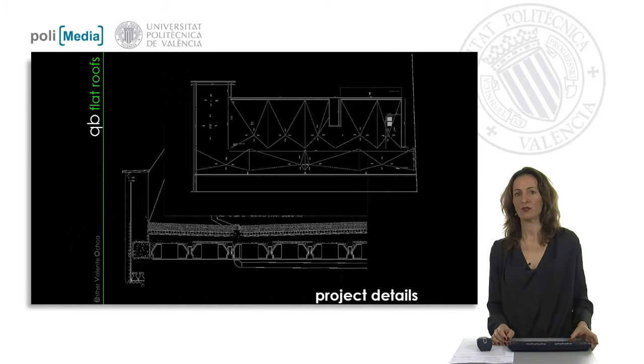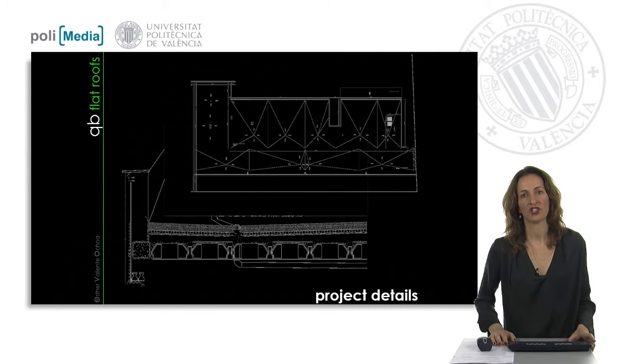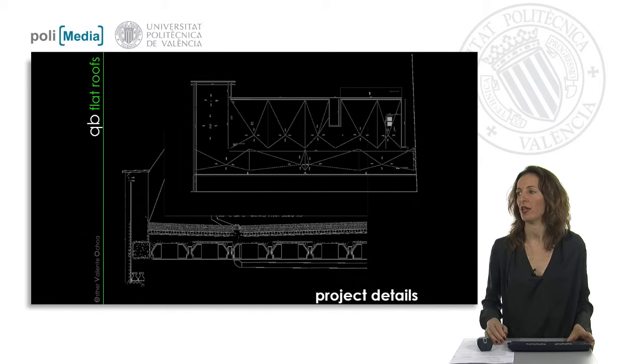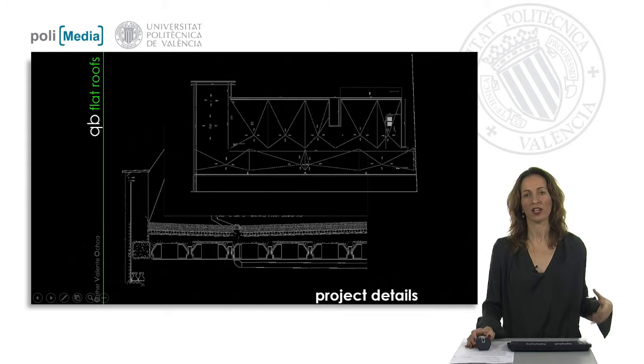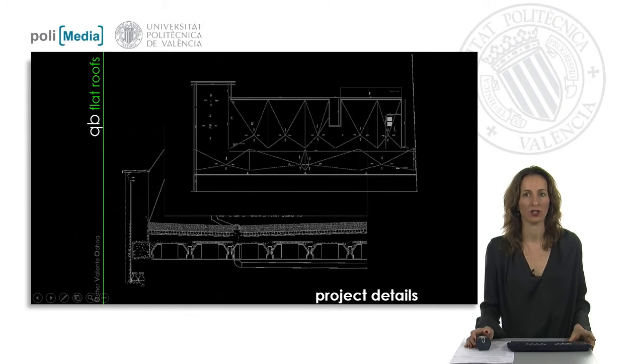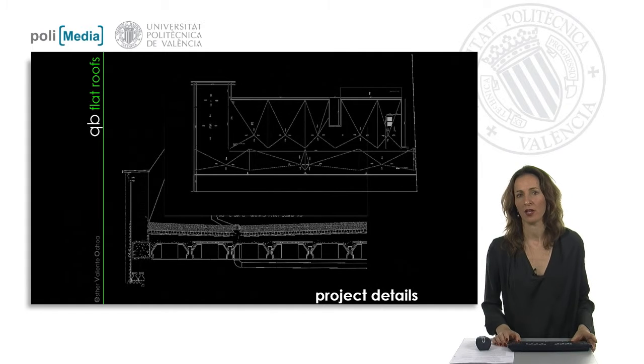In the project details, we will find the specifications for our building. Remember, buildings are not standard products, so we need to check and supervise all the specifications in each case in order to have control. In this picture, you can see how the whole surface of our roof is divided into units in order to be checked and supervised during the construction at different stages with different reports.